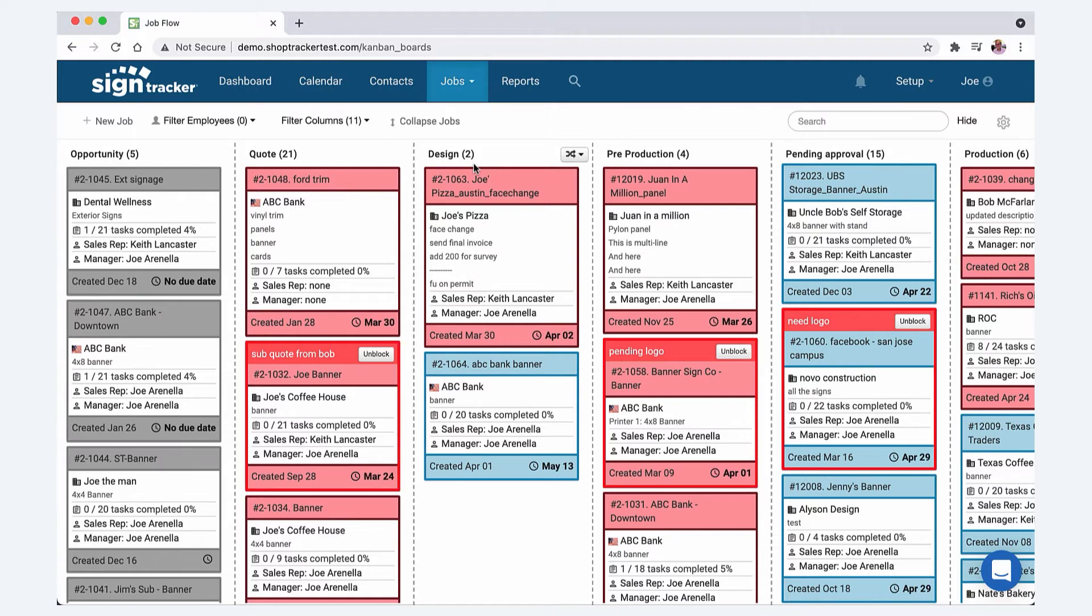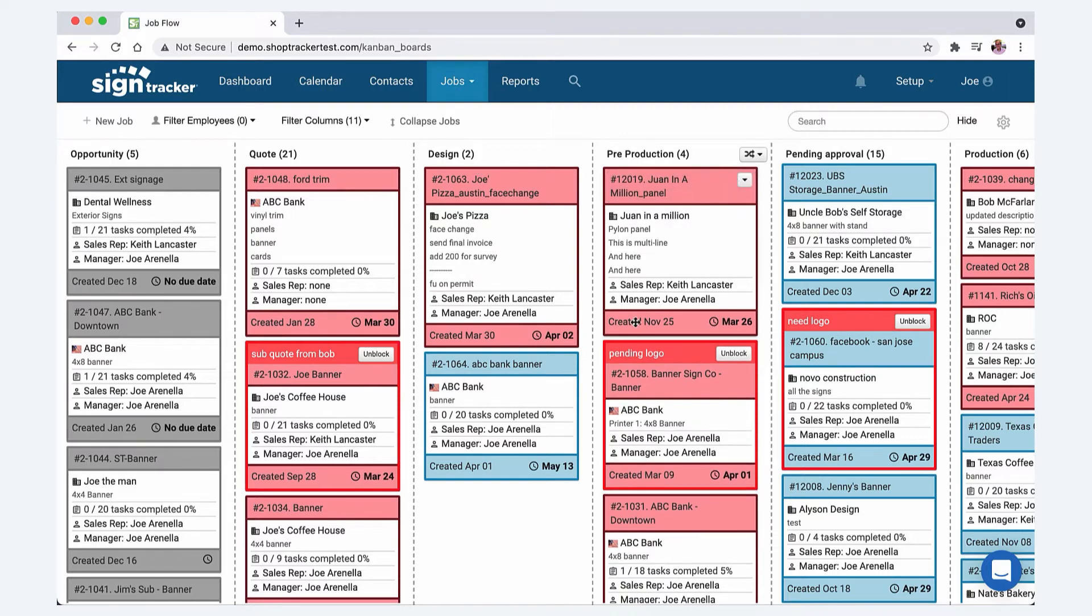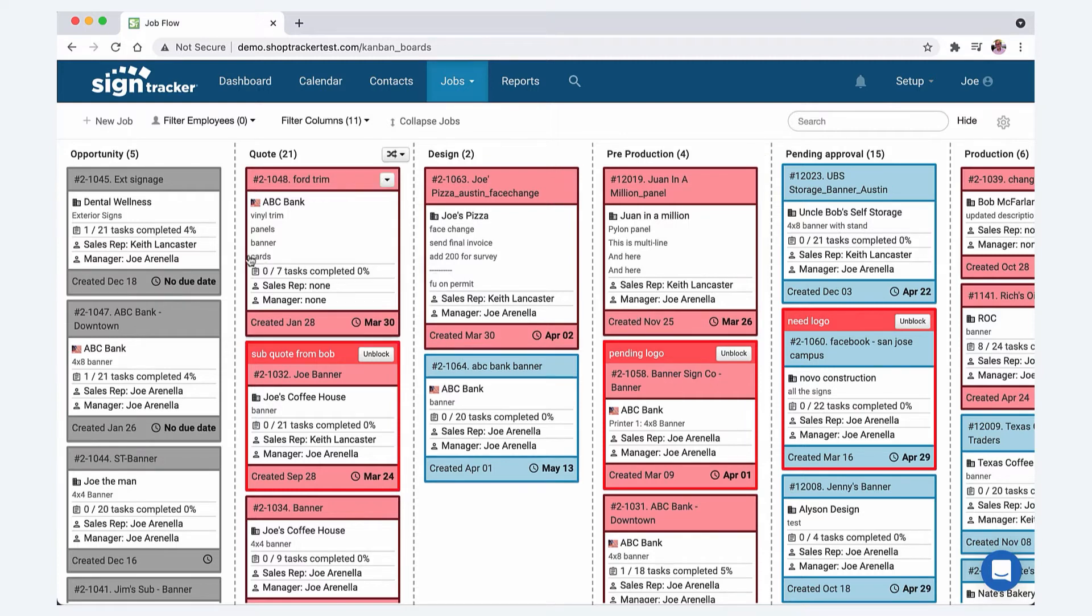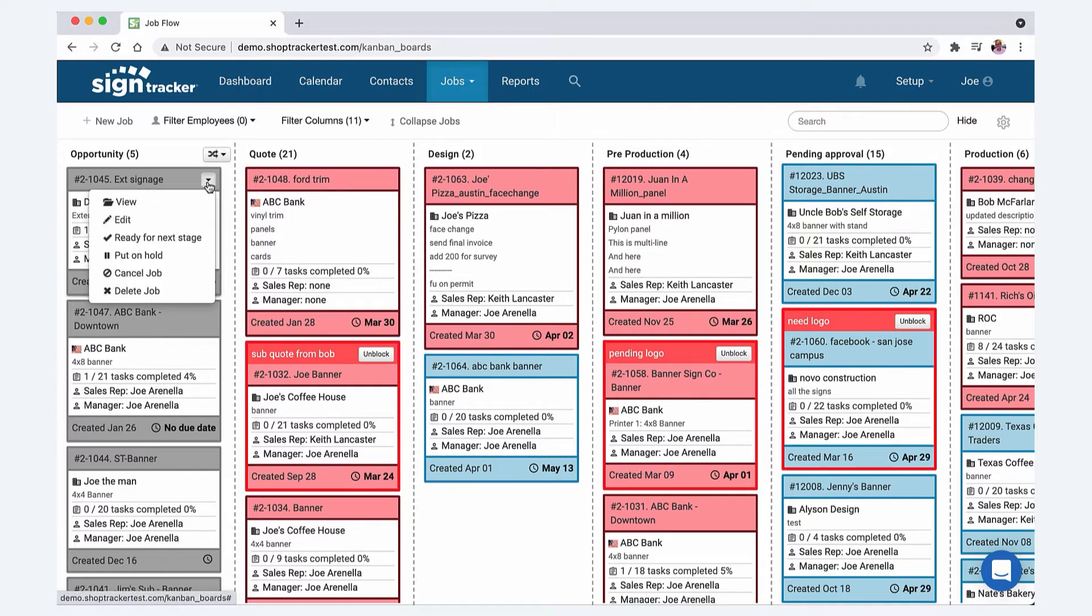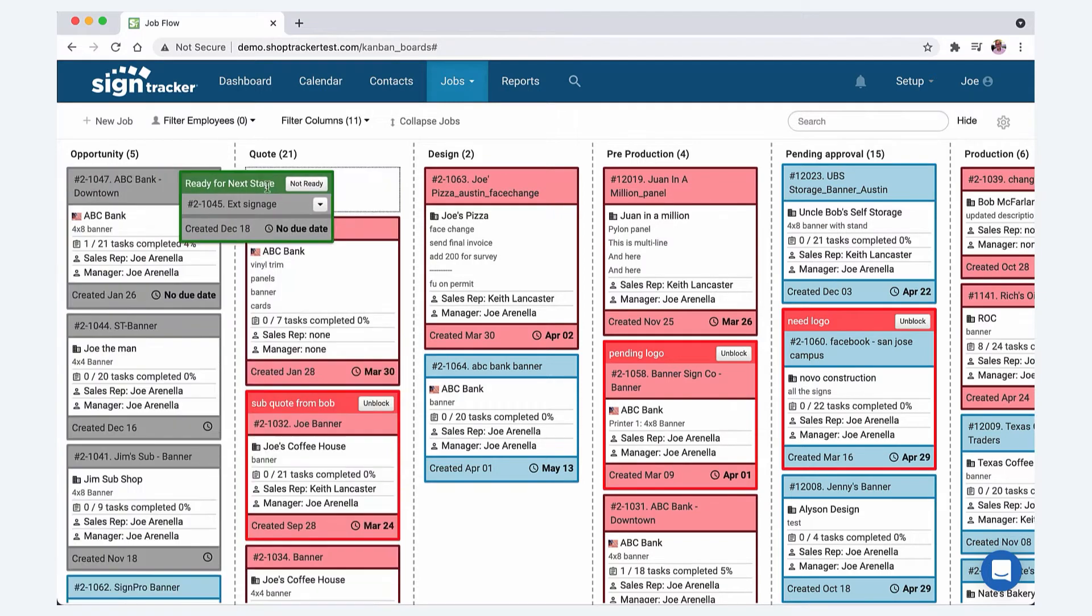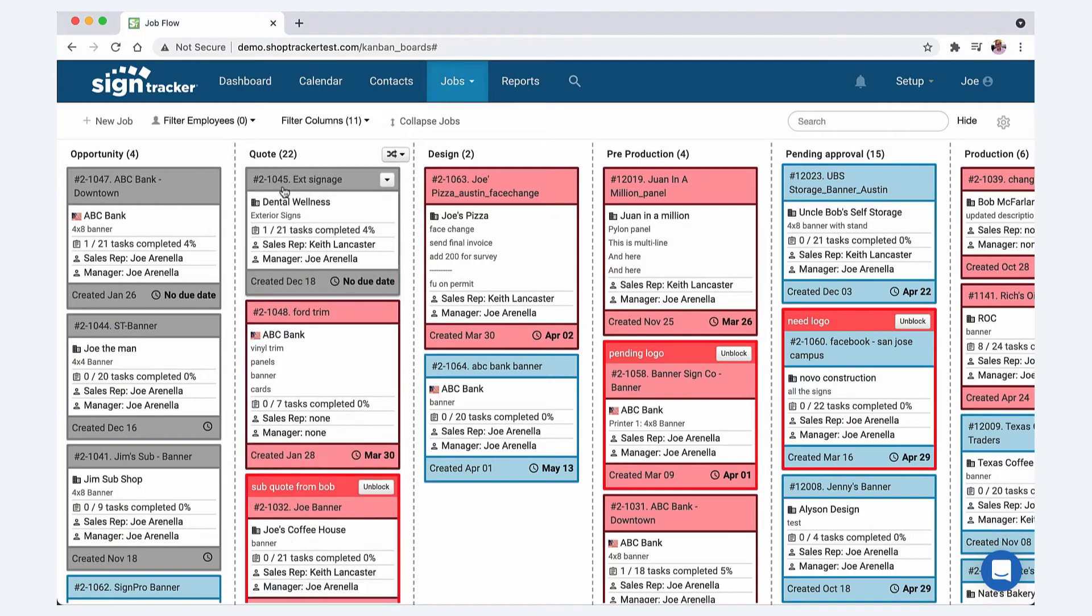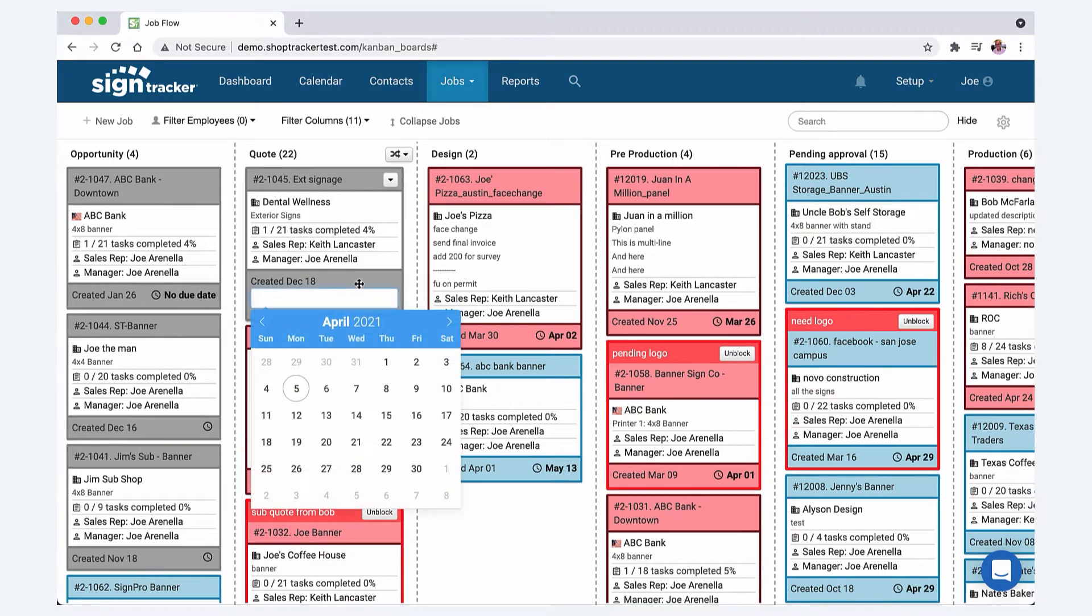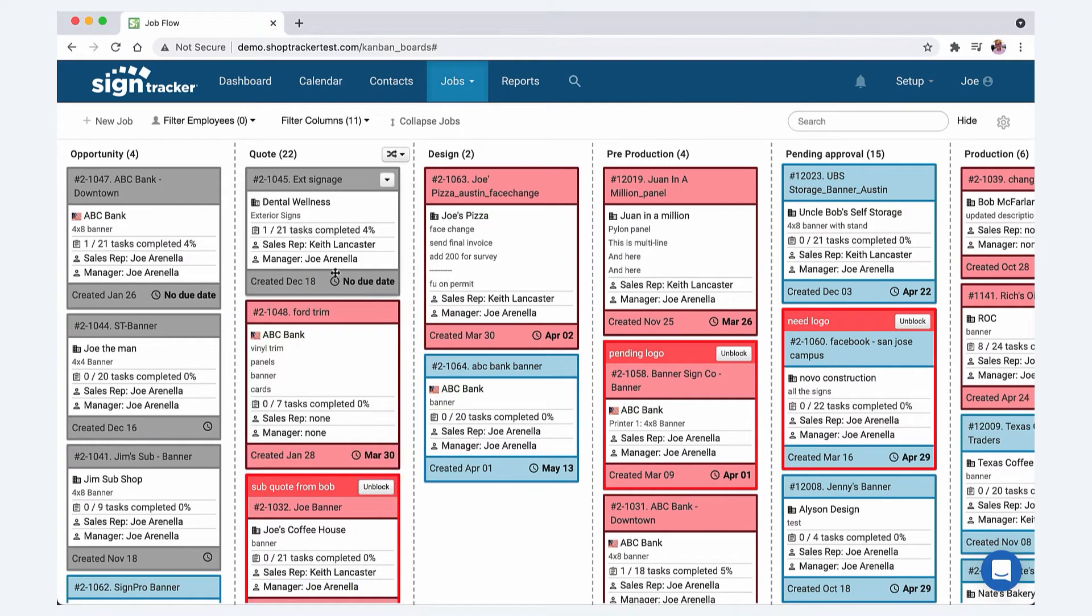Some sign shops I've seen have actually had their columns labeled by a router or a printer and that's fine too. Once the job is sold then at this point you can put it ready for next stage, and whoever is doing the next thing to it will see that and can move it over.